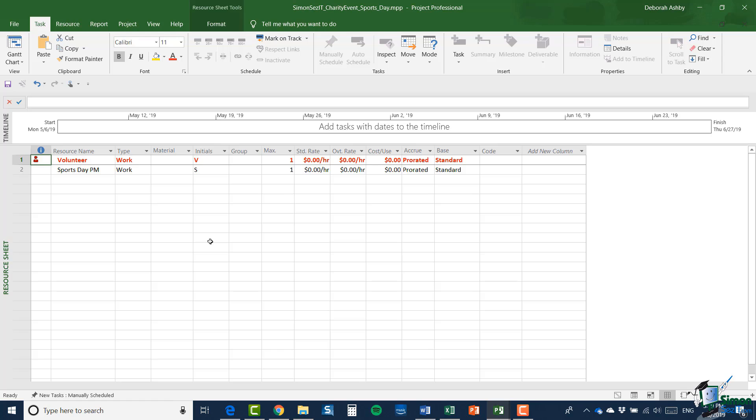And so you can see, for example, here, one consequence of that is that the volunteer resource already seems to be over allocated because when it creates the resource sheet, it defaults to creating a max of one resource. And if we looked at the resources already allocated in the original project, we would see that within the sports day and barbecue summary task, we already have more than one volunteer assigned to tasks.